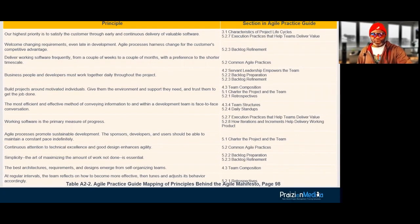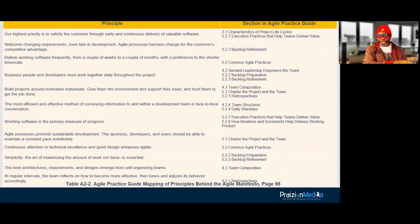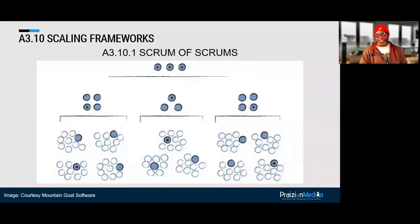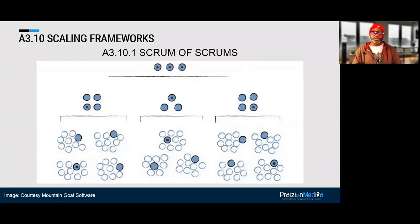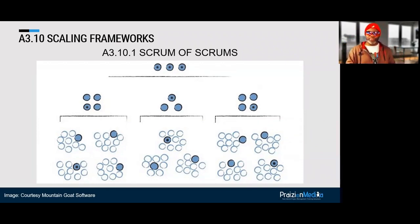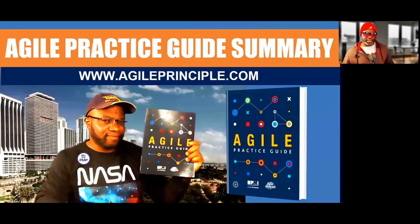We have a boatload of other Agile frameworks talked about, everything from Scrum to Kanban. I'm going to just touch on scaling — specifically a Scrum of Scrums. A Scrum of Scrums takes one member from each group and scales that up so that at higher levels we have fewer people meeting, freeing people up to do work and coordinate at those higher levels. And that is the end of our Agile Practice Guide summary.